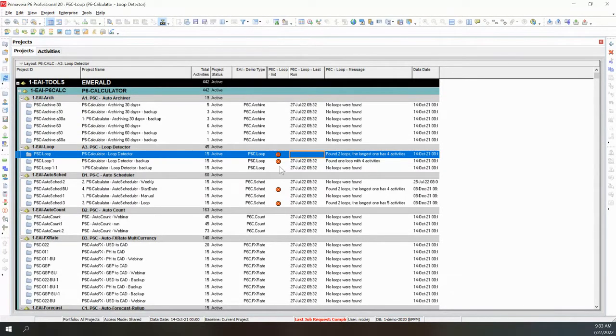So some of the other types of automations where we're looking at fields and then putting a message up here would be in-service dates. So we're monitoring the in-service date commitment. We're monitoring the in-service date that we're scheduling right now. We're flagging it with a stop sign or a yield sign if it's a date range. So let's say it's slipped by 1 week. That might be a yield sign. If it slips for 2 weeks, it might be a stop sign. Okay, so that's a very common one that we've put in for many different clients.